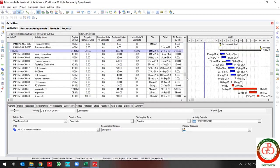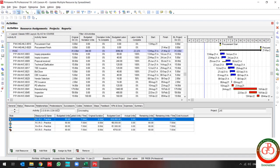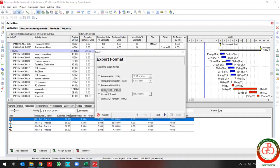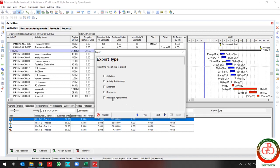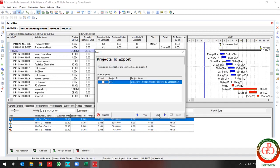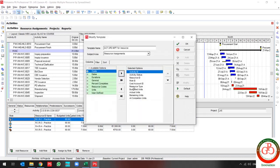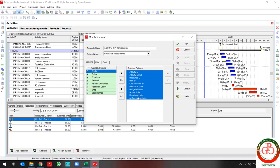But I need to update my resources too. As you see, my resources may not accept any actual values. So I come back to the export, use the spreadsheet, and this time I use the resource assignment. Create the export and use these fields in order to update the resource sheet.